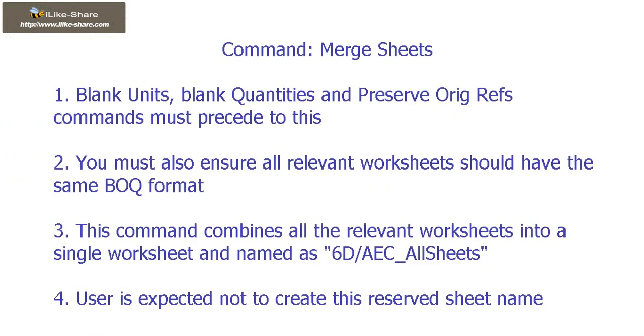Blank units, blank quantities and preserve original refs commands must proceed to this command. You must also ensure all relevant worksheets should have the same BOQ format. This command combines all the relevant worksheets into a single worksheet and named as AEC All Sheets. User is expected not to create this reserved sheet name for other sheets.